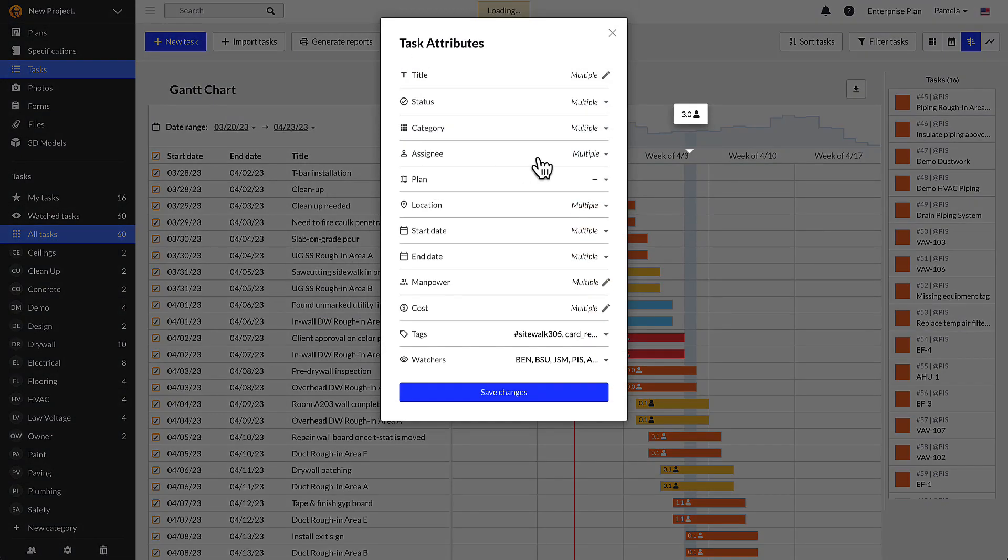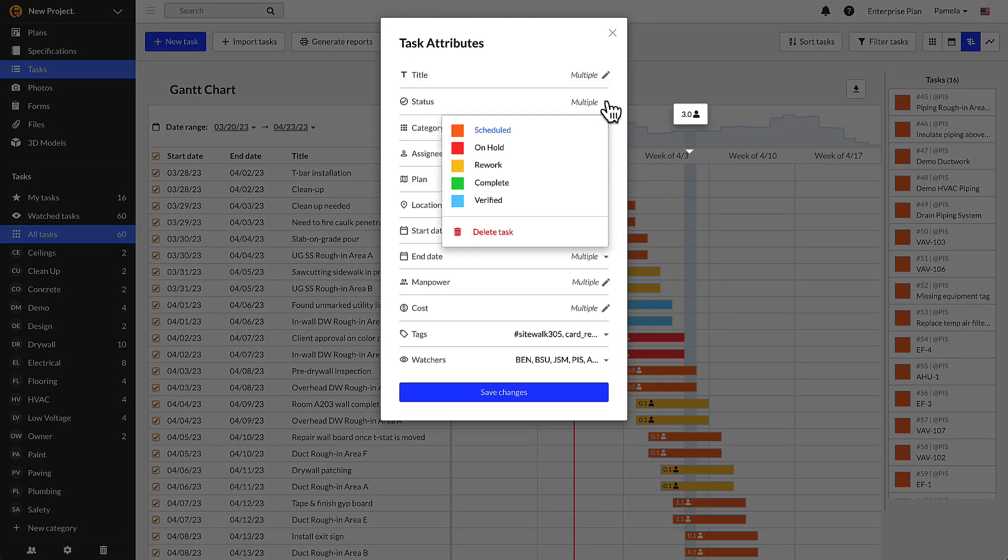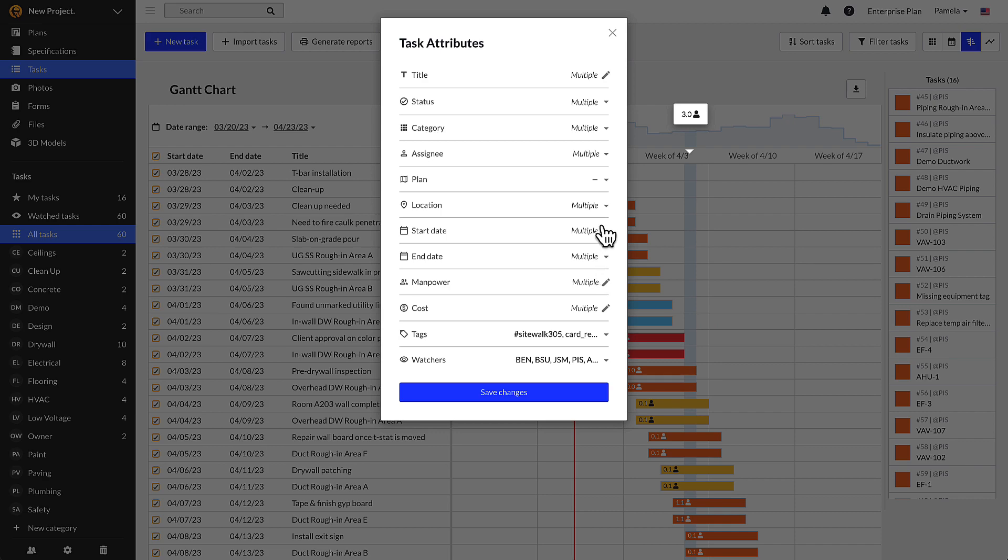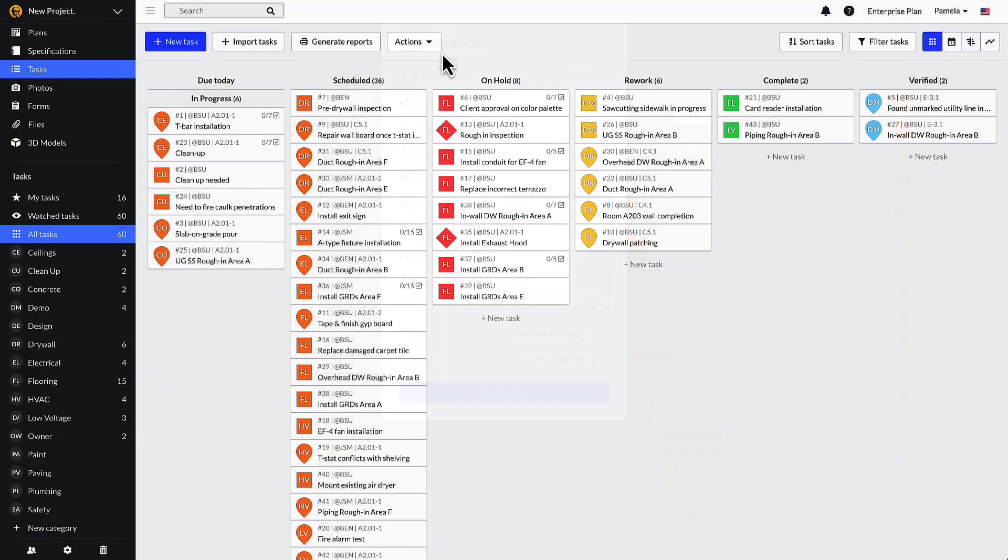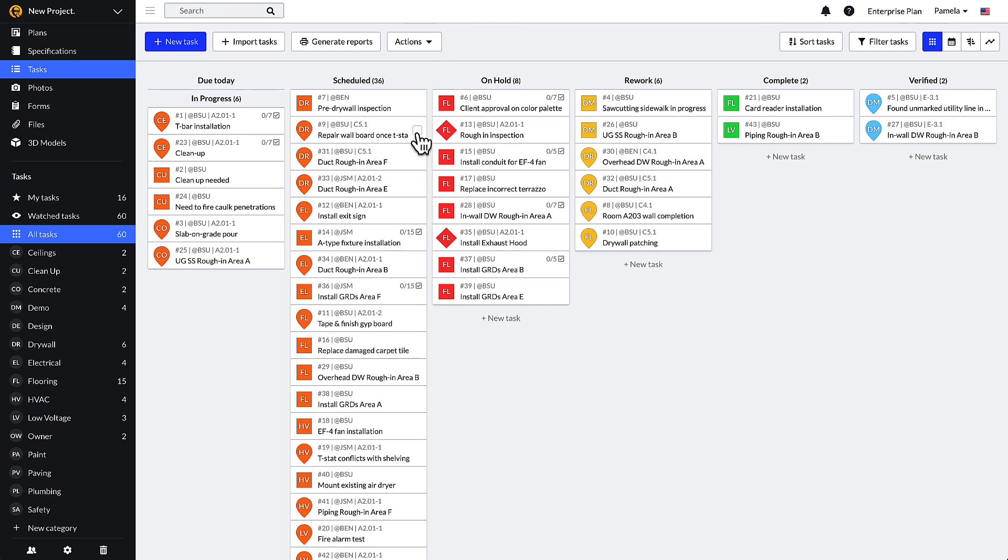Once a project is populated with tasks, modifying a large quantity of them at once is best achieved using batch editing. Batch editing is available for use only on the Fieldwire web application. To use the batch edit feature, hover the cursor over each task you want to edit and click the checkbox that appears.